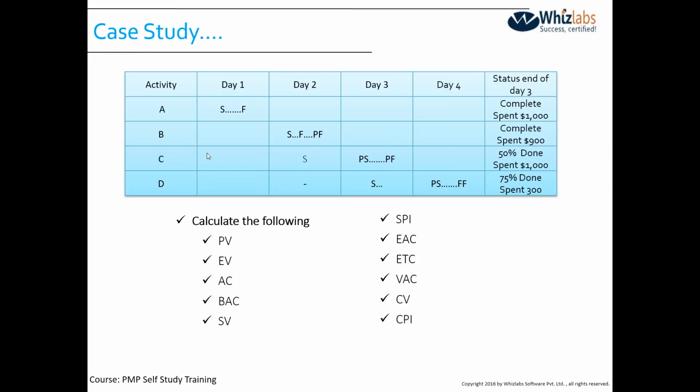Is it possible that EV can go beyond PV at any point during the entire project life cycle? If yes, then why? Rajesh, it is okay. Now, at the end of the project, EV cannot be more than PV. If it is more than PV, then you are doing something which is not part of the project.